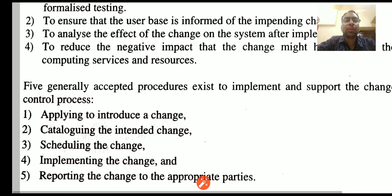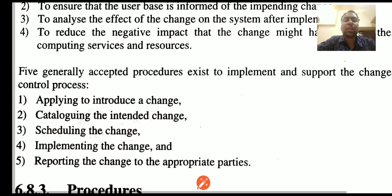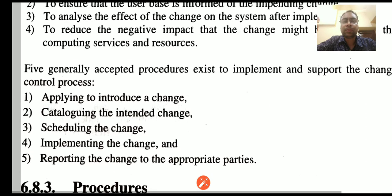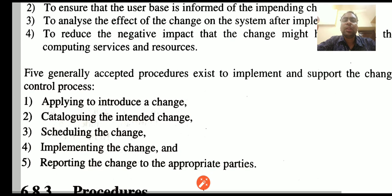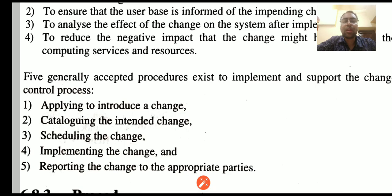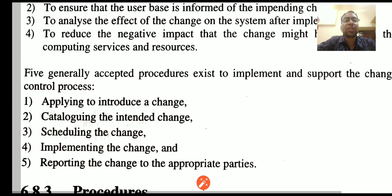These are the generally accepted procedures that support the change control process: first, applying to introduce a change; second, cataloguing the intended changes; scheduling the changes; implementing the changes; and reporting the changes to the appropriate parties.